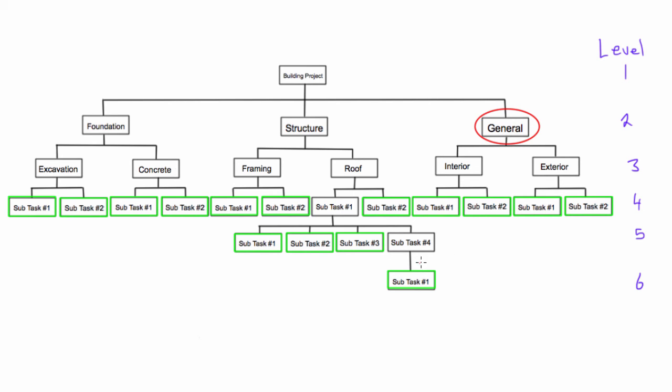And also, the other thing to look at is down here, this is a single breakdown, and we want to avoid these if possible, unless there's an industry standard that forces us to use one. Everywhere else you'll see that we always have one element leading into two or more. Here we have two, here we have this guy leading into four, but here it's just leading into one.